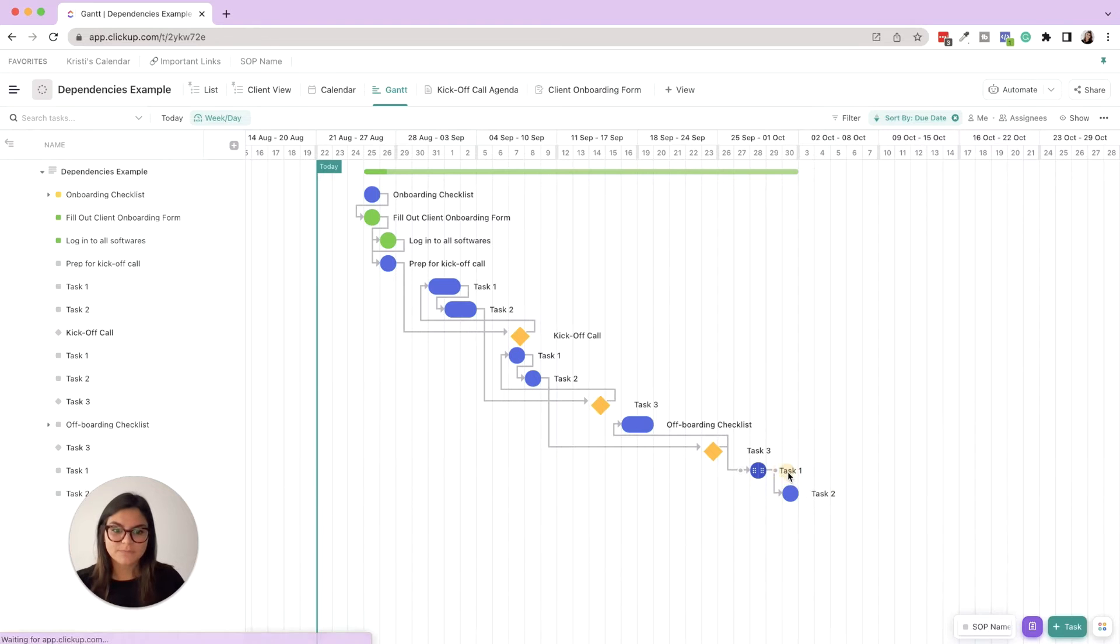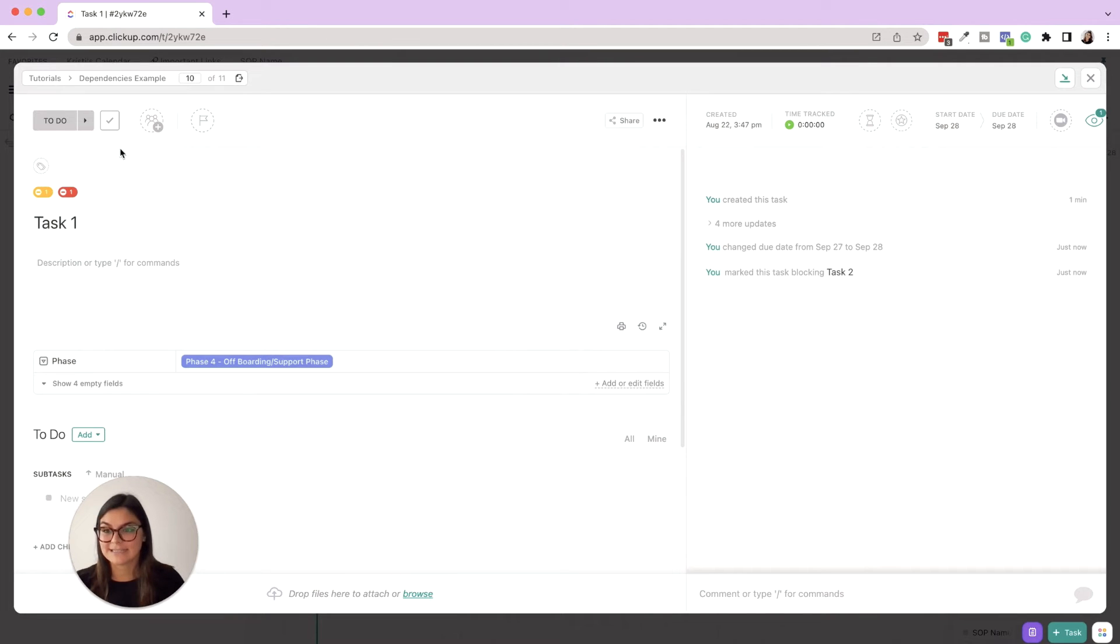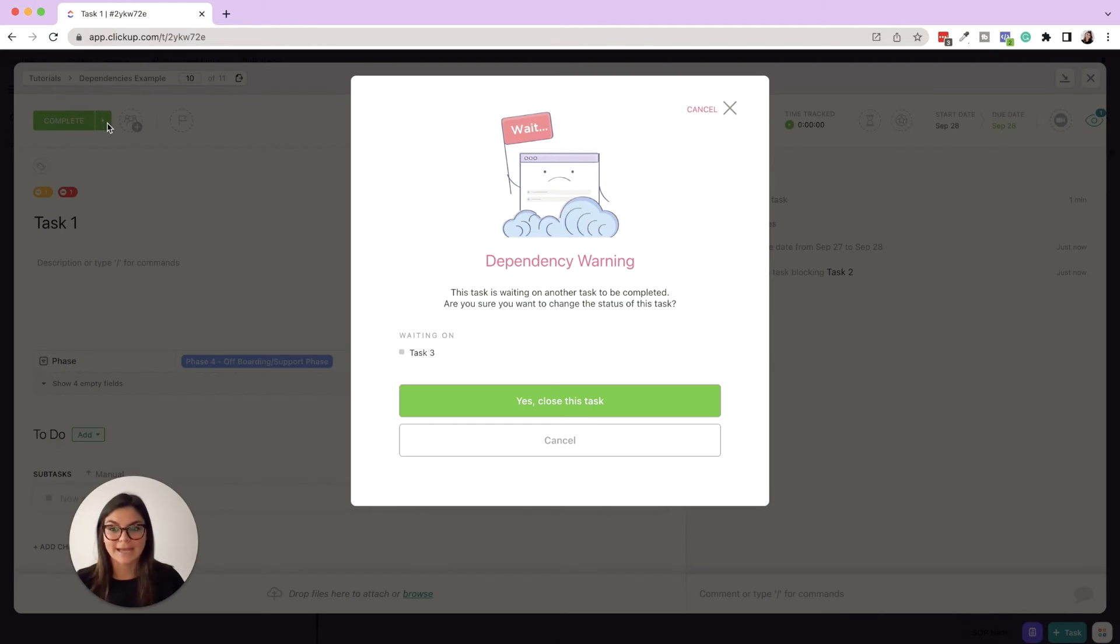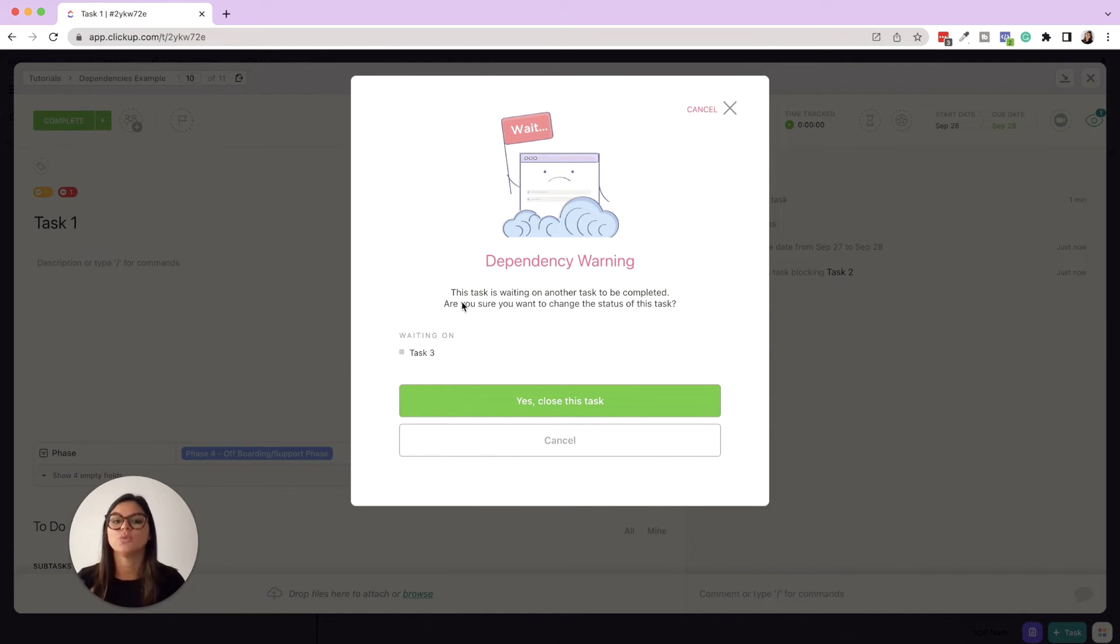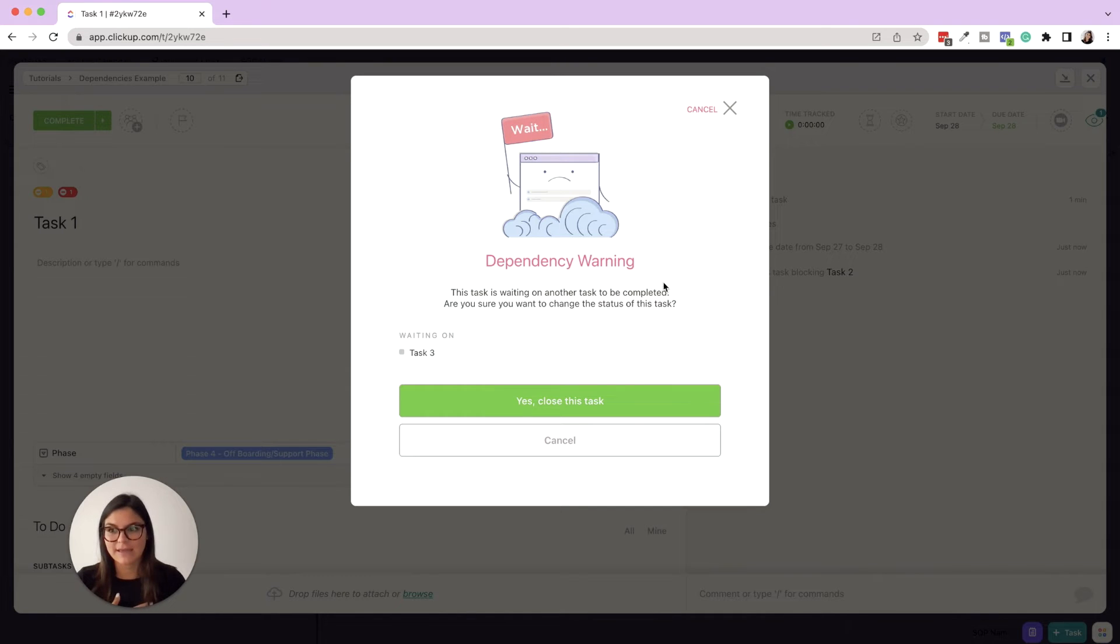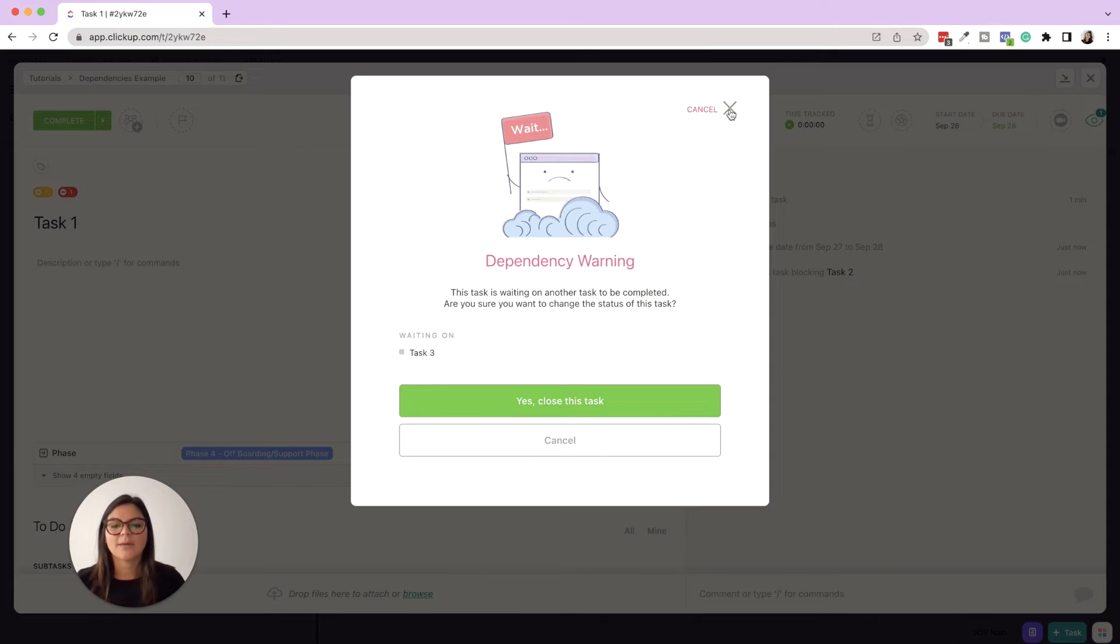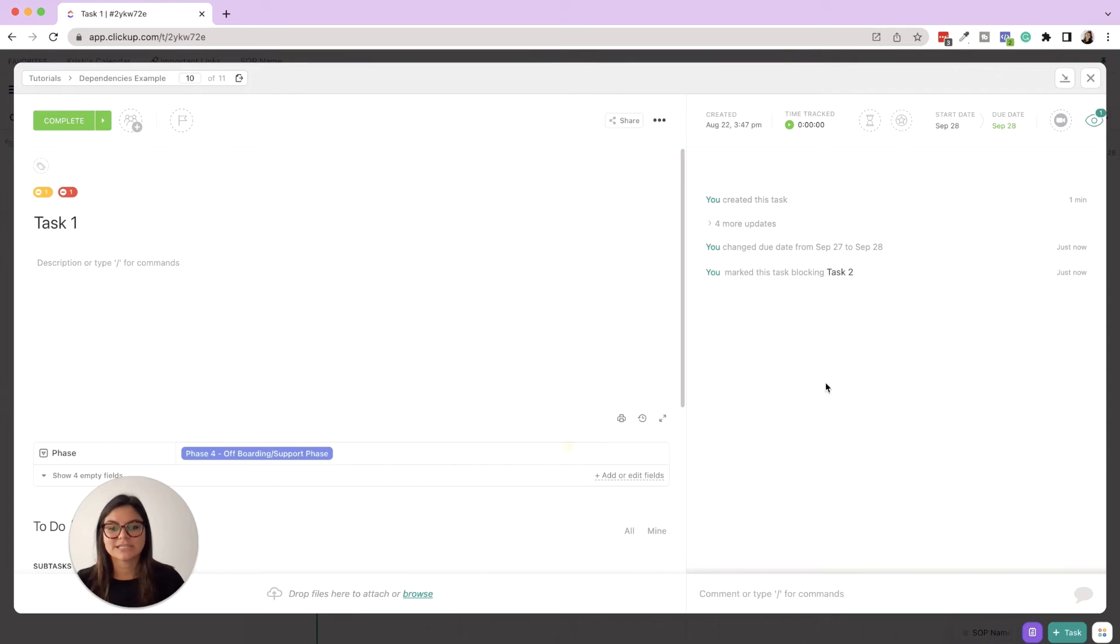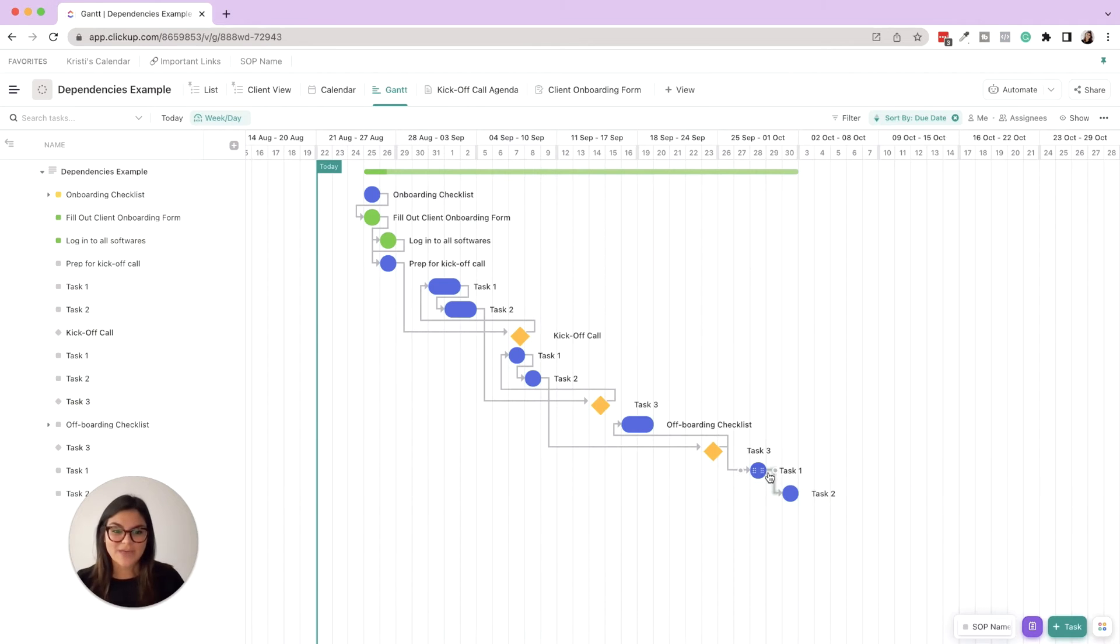It's gonna say hold on, this task is waiting on another task to be completed. Are you sure you want to change the status of this task? It's basically saying you can't close this because you're waiting on something, but maybe sometimes you can. So you can choose to yes, close this task, or cancel. Okay, so that is one way to add dependencies.